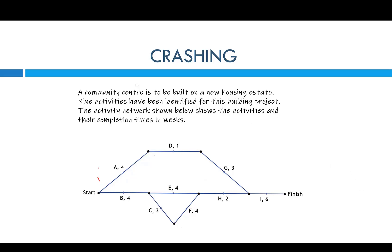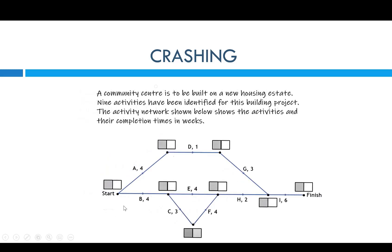We can see that activity A takes four weeks, activity D takes one week, activity G takes three weeks, and so on. So now we need to do forward scanning and backward scanning and get our boxes nice and neat so we know how long this project will take.